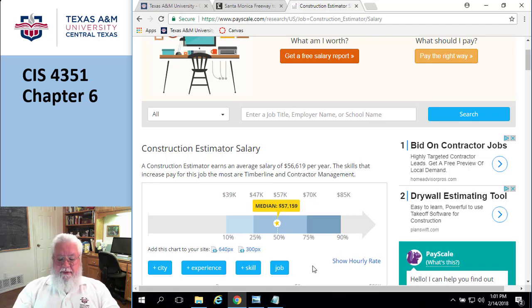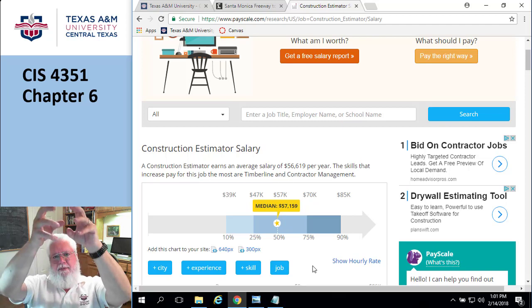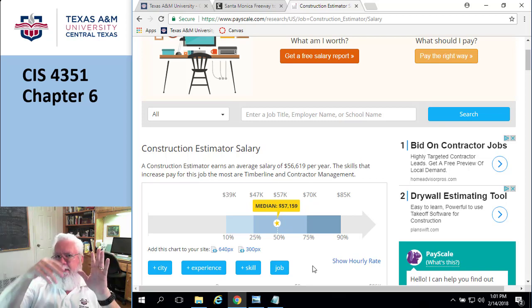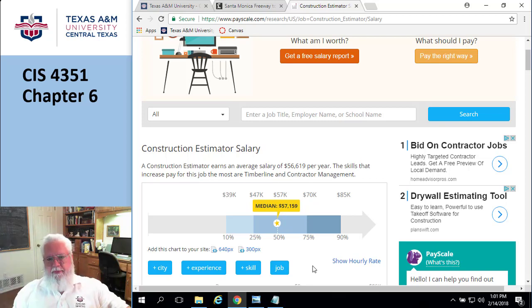And then the last one is, do you have the capability? For example, construction again. I was putting together a house, and I wanted a brick chimney, all the way up. And the contractor said, none of my masons are certified for high work. They can do brick on the walls, but they can't do the brick high because they don't have that certification. And I went, so what do I do? And he says, well, we can put siding up there. And I went, okay. And so we changed the plans. But the point is, do you have the skill sets?